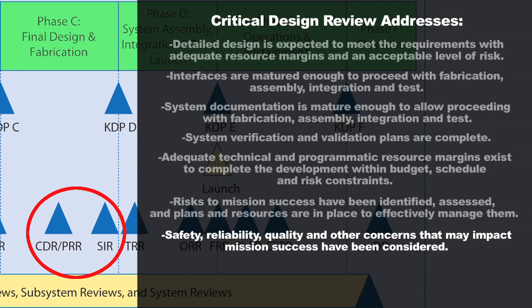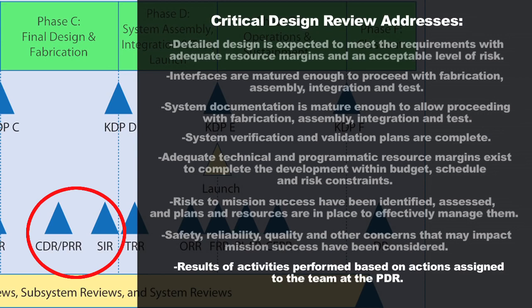Now, again, at the end of the critical design review, the design review team is going to want to know, back to the preliminary design, did I close out all of the actions? So did the design team look back at all the preliminary design review actions that were assigned, and did they close them all out to the satisfaction of the review team? So again, that'll be one of the factors that are reviewed in critical design review as well.